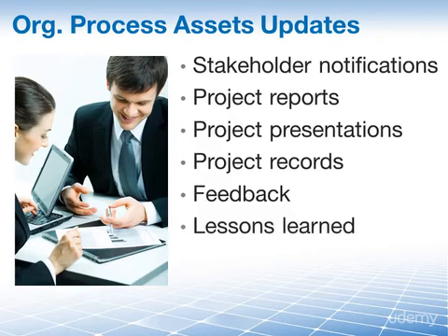And of course, we will also have lessons learned. The lessons learned documentation includes a root cause analysis of the issues that we faced on the project, the reasoning behind why the project manager chose a specific corrective action, and so on. The lessons learned are documented and distributed, and they become part of our historical database for the project and for our performing organization.